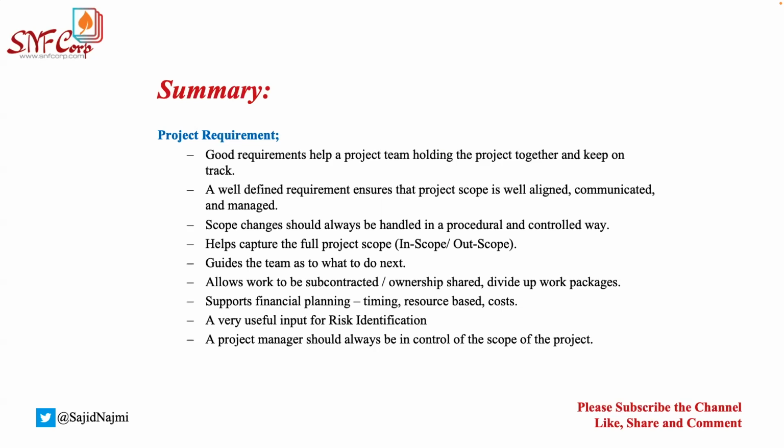Yes, as in, you don't need to write all those things which are not required. But say, for example, you were talking to a customer, capturing the requirement, and the customer gave you something that you analyzed on the fly and realized this cannot be done. It's not possible, actually. Then you explained that to the person with the reason and the technical justification why this cannot be done, and you both agreed, okay, let's just make it out of scope. So you would purposefully write down in your documentation, this is out of scope and this will not be done.